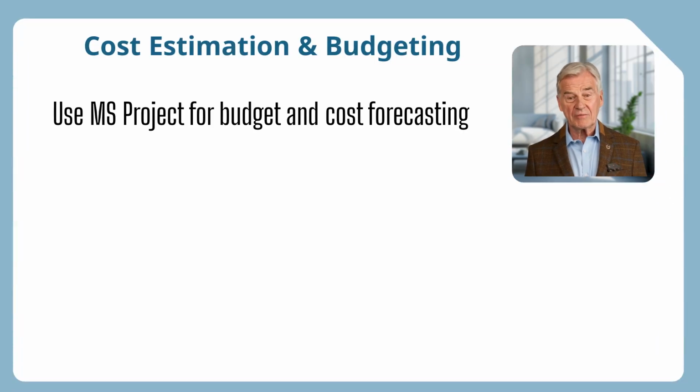MS Project is also better built than ADO for budget and cost forecasting. MS Project allows you to easily and quickly assign hourly rates to resources, calculate cost per task, and see cost roll-ups by features, phases, or even milestones. Financial estimates allow you to model budget burn rate over time.